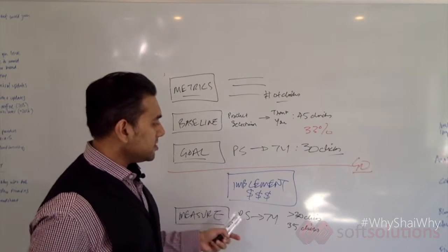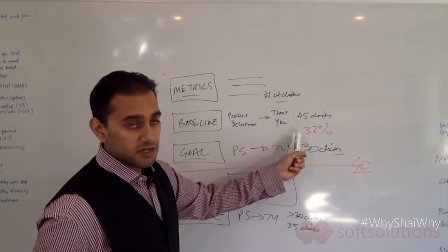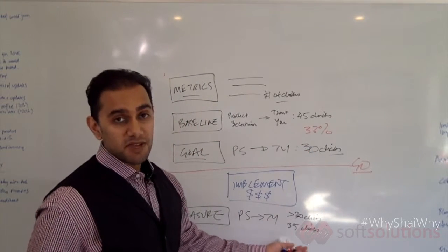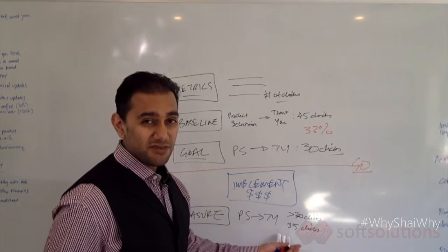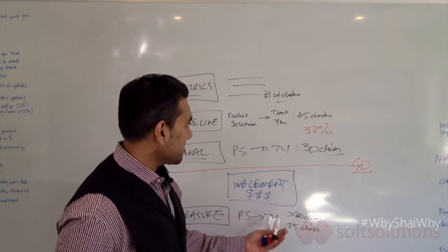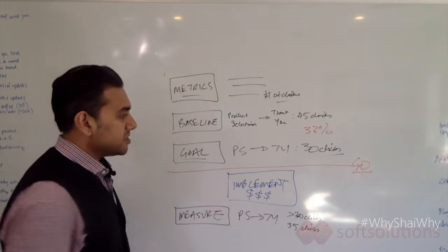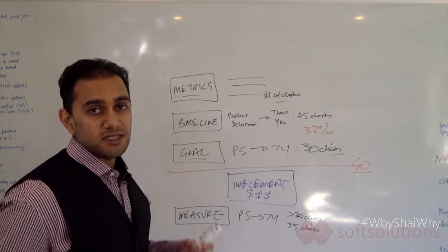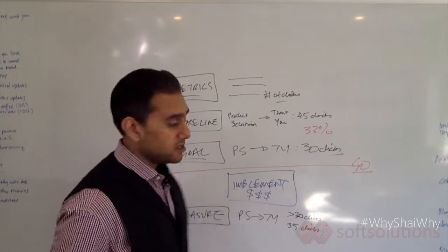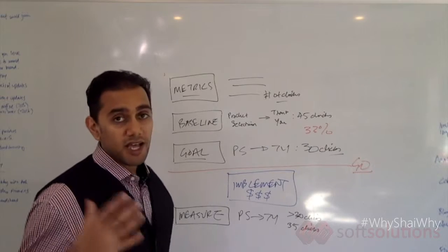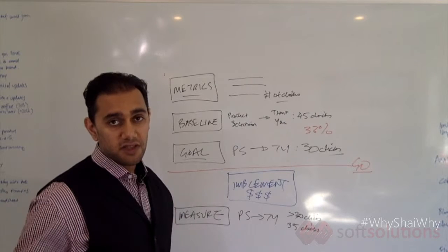And because all this person knew was that there was going to be a 33% decrease, this is actually quite a big failure, right? And the reason for that is because it's now not a 33% decrease. It's more like a fifth, 20% decrease. And so what's happening is that the project may not be meeting its stated goals, and especially the analysis this person has done in the go section, and therefore has been a failure, right? So don't think just because the number went down from 45 to 35 that everything was great.